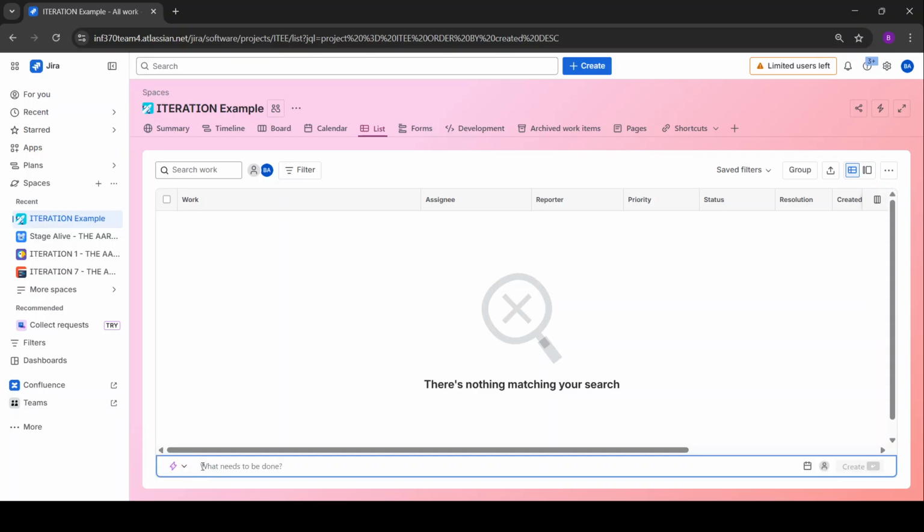And something to note is that if you see this purple lightning bolt that you most probably will see when you first create the space and create your first task, I suggest that you change it. It's called an epic. You change it from that by clicking this drop down to a task. With a task, it's easier to create subtasks and obviously create assignees for those top subtasks and due dates for those subtasks as well. So just click on task, and from there, whatever new task you create will keep to this option.